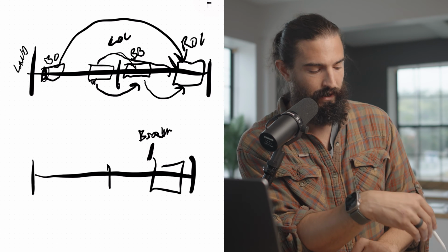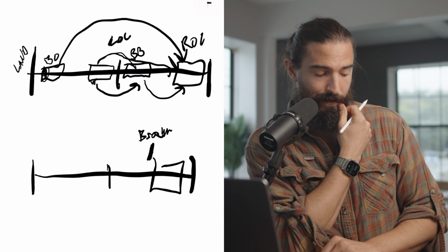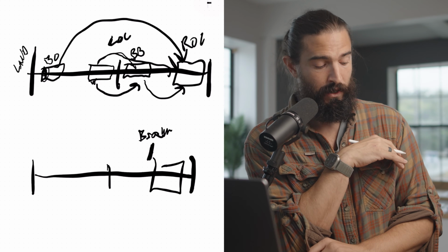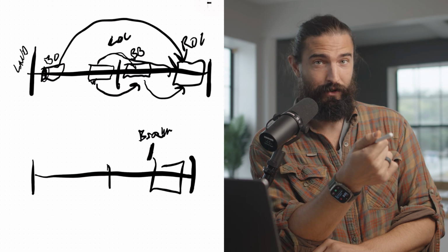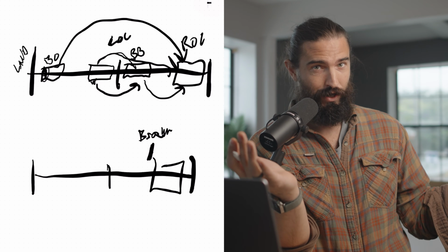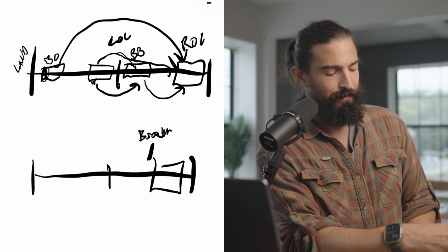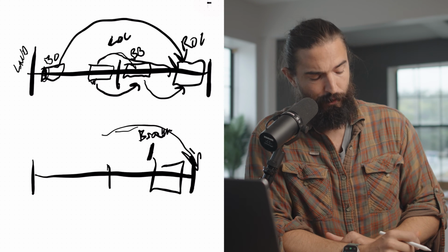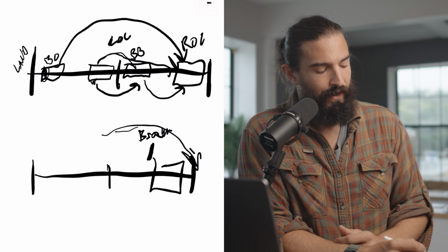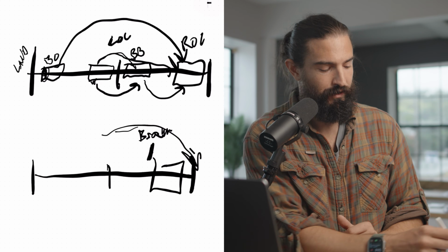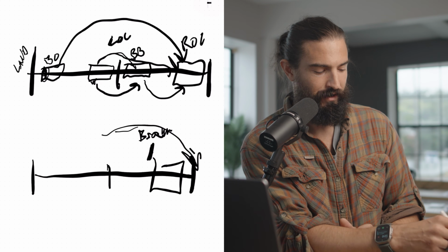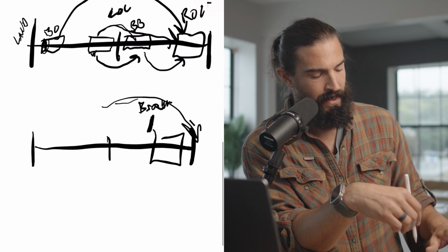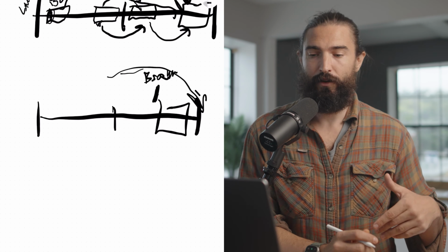Okay. And there are some houses in that neighborhood that have super nice tile in the bathrooms and the accent tiles and so on. But these got away with having the shower inserts. Looks like I'm shower inserting. Because trying to push things to the top, what the neighborhood has never seen, I'm going to do all of them and spend all my money. That is called speculating. There's no proof that those things worked out. Nobody in the neighborhood did all of them. So, wasted money. That's what I hear. Okay. And anyway, so I do the baseline and then the final thing is the big three.